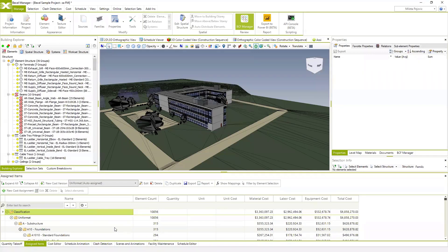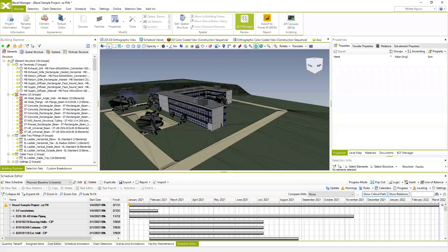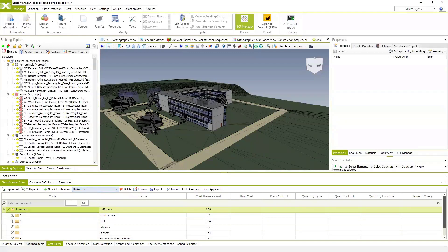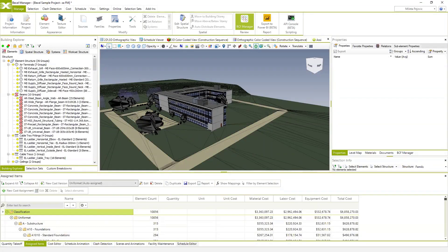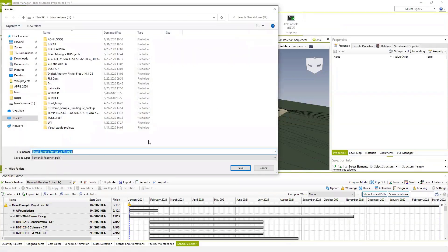If you don't have any information, the exporting process will just export the BIM model itself and the elements it contains. So if you want to use all the information about cost, resources, schedules, and clash detections, you have to create all these first. This sample BIM model has all of these — we have cost classification based on UniFormat and MasterFormat, we have assigned cost versions, and we created a few schedules using that methodology.